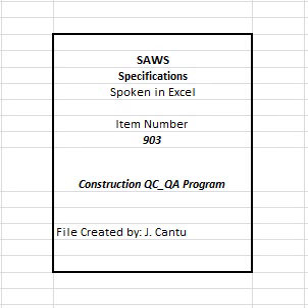6. Material testing. A. Attach testing analysis data of materials to be used on the project to the appropriate material submittal. B. Submit a QC testing plan, for example backfill material, roadway construction material compaction testing, pipe testing, motors/pumps tests, other tests as required or appropriate. 2. Construction phase. Prepare written procedures with respect to issues including: A. Construction sequencing and construction schedule, including, but not limited to, bar graphs, phasing plan, network diagrams, critical path item identification, equipment/material/supplies delivery impact, narrative reports, etc.